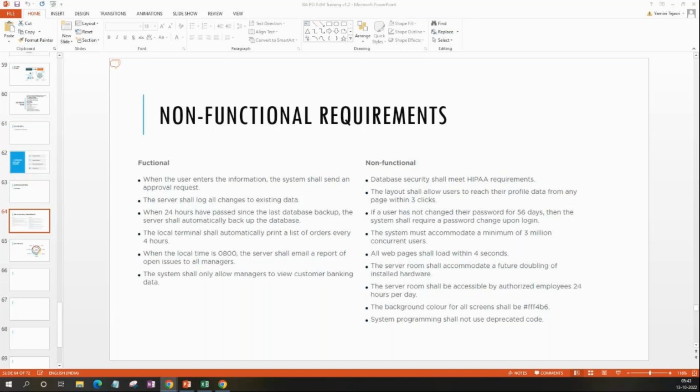So you can mention the points in epics, and then convert them into user stories, and the developer can make sure that the non-functional requirements user story is taken care of. Okay, so we should mention it differently, not in the same one. Yeah, you can prefix with NFR. You can just prefix with NFR and write it so that you are able to differentiate between NFR, non-functional requirements, and functional requirements. Okay, got it. Any other questions? No, I have no questions. Okay, fine.